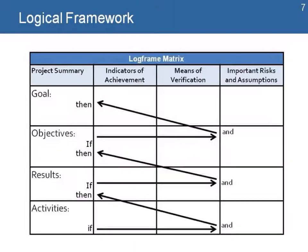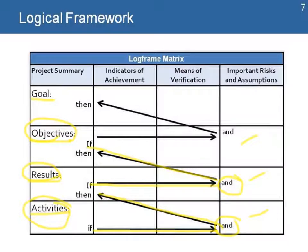Let's see how that works with our matrix. We complete the matrix by describing the goal, the objectives, the results, and the activities. We also list our risks and assumptions. The logic follows as this: if we do the activity and the assumption holds, then we are able to achieve the result. If we achieve the result and the assumption holds, then we achieve the objectives. If we achieve the objectives and the assumptions hold, then we achieve the goal of the project. Notice that at this level there are no risks or assumptions because we are not moving higher in the hierarchy.